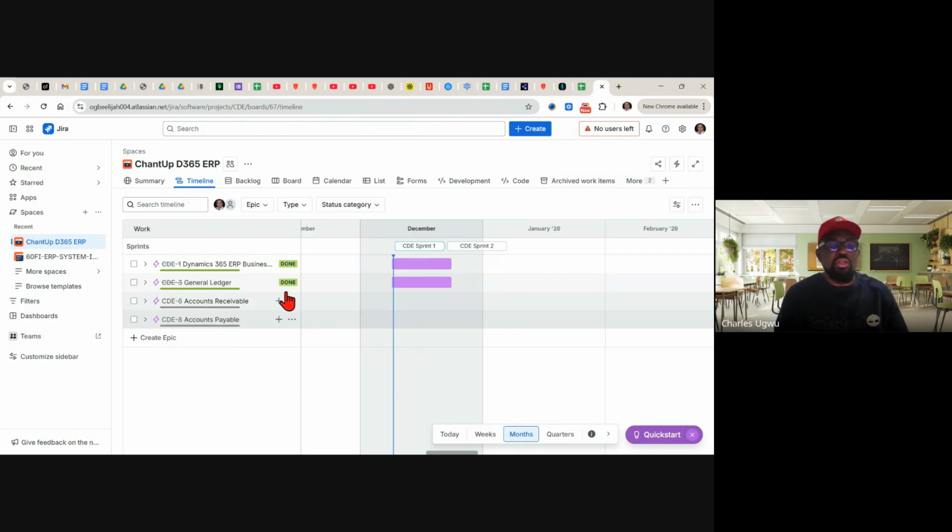This work they've done, they need to go and present to the stakeholders to get feedback from them. And that is what we call sprint review or sprint demo. You need to go and demo to the stakeholders. So once you finish the demo, we gather the review or feedback that will be part of the next work. And then once you finish that review with the stakeholders, then the next thing you have to do